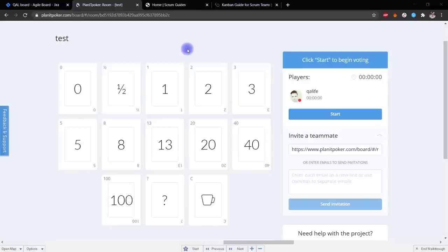The functionality of, for example, updating your account name, your login in the system. We compare these two requirements. The first one, for example, we gave one story point in the last iteration. And we compare how much more complicated the second one is compared to the first, where we just registered in the system, since the second already has much more acceptance criteria. And we assign them story points.